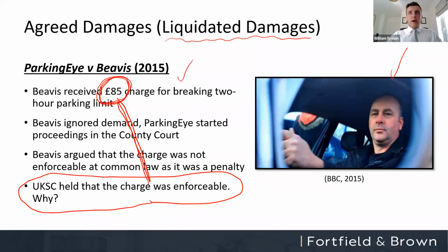So we had one question there in amongst the discussion, again, I think from Thomas. His question is, in relation to a building which is subject to rental income and the rental sales on which the liquidated damages were based but did not materialize, would it become a penalty? The answer is no, Thomas. Again, at that point, the figure that you're putting in was probably based on a genuine pre-estimate of the rental income, which is fair enough. You're doing it under the old law, but looking at the new law, that figure is still going to be proportionate. That's what you expected to lose, ergo it is proportionate.